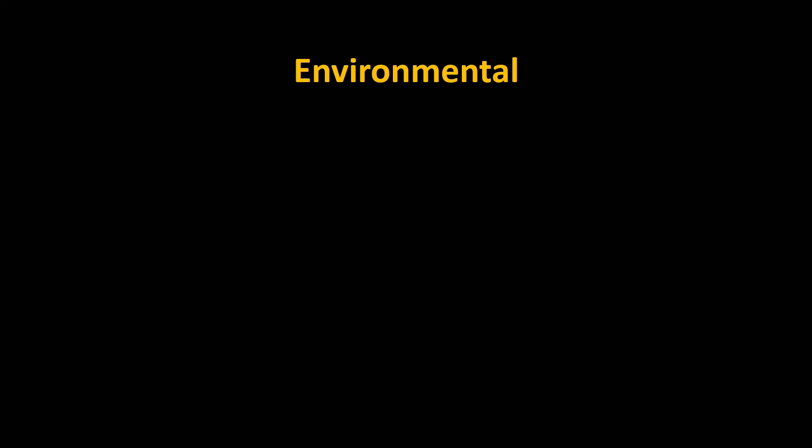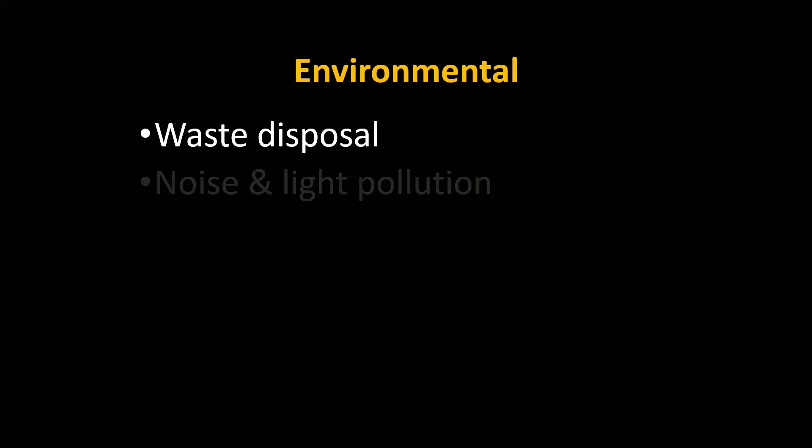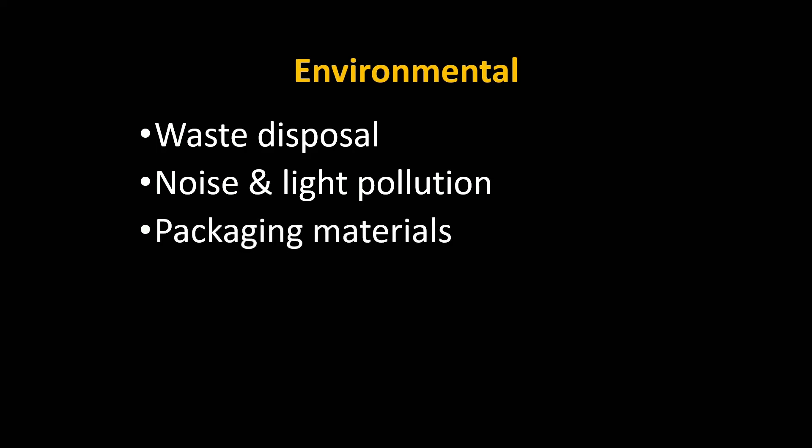Environmental factors are anything to do with how our project or the results of our project will affect the environment, or will be impacted by the environment. How are you going to manage your waste? We need to consider emissions such as greenhouse gases. Will our project create large amounts of noise, light or dust? What is our packaging made of — is it non-recyclable plastics or paper-based materials? And how are we going to transport resources and the finished goods?